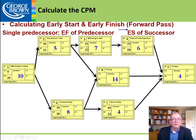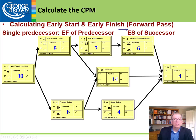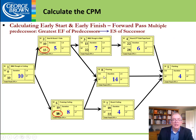Continuing the forward pass: the early finish becomes the early start; plus 7 gives us 22, plus 6 gives us 28. The 18 becomes the early start plus 4 equals 22. Where activities merge on the forward pass, do we take 15 or 18 as the early start? Since both predecessors must be done before flooring can start, we have to wait for 18 days — we take the larger number where successors merge. So 18 plus 14 gives us an early finish of 32.